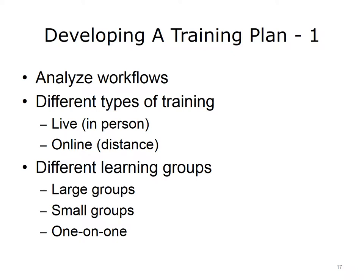To develop a robust training plan, the organization should first analyze workflows to understand and define the different types of training needed for the EHR implementation program. The next steps are to appoint or hire trainers, locate a training venue, and then schedule the training. Trainers may be personnel within the organization, or they may need to be hired for the duration of the implementation. Many organizations develop their own on-site training protocols and establish venues for training. Training can be conducted live, that is in person, or online as part of a distance learning program using webinars or video teleconferencing.